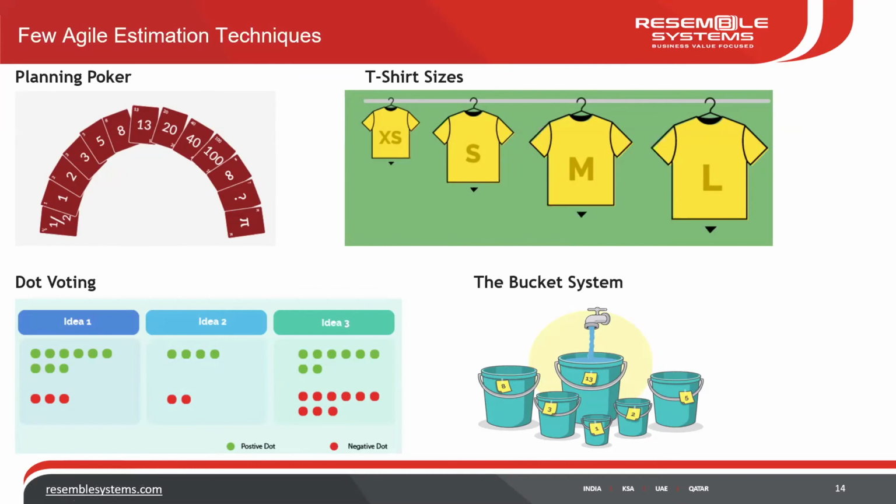And then the team starts putting the tasks there, right? First, we take up one task, and then, for example, if it's a medium, we keep it on a medium, and then start relating the next task to it, and then either put it as okay, this task is something that will take more than this task which was in medium, so let me put it in large. No, this task is less compared to the medium, so I'll put it in the small. So this is how they do it.